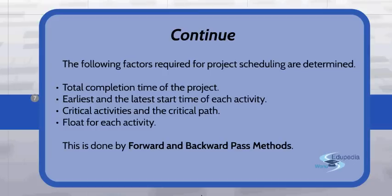Float, or free time, is the length of time in which a non-critical activity can be delayed or extended without delaying the total project completion time. Only non-critical activities have time gaps between them; critical activities have no time gap and cannot be delayed at all. All of these factors are determined using the forward and backward pass methods. In the subsequent sessions we will see how to use these to calculate the total completion time, the earliest and latest start times of each activity, the critical activities and critical path, and also how to calculate the float.